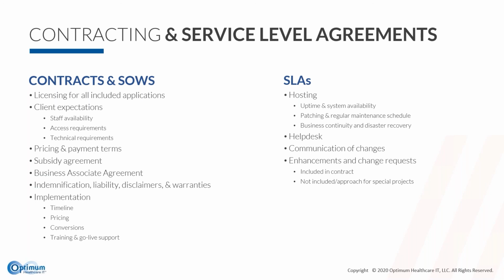And I think the final thing to mention there is kind of the special project. So even for things that wouldn't necessarily be within your standard services scope, you want to have a good understanding of what we could do if we were willing to pay some extra money to get additional build, additional support, and then what's the process for requesting that, for getting it approved, and roughly what is our hourly cost, or however you charge for those items as well.